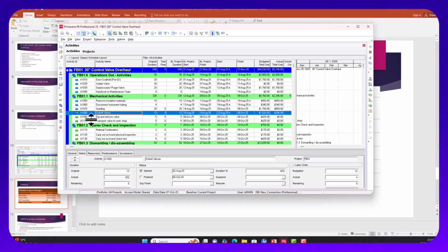So let's go ahead. So first of all, you're going to look at your activities, because you have two categories of activities that should bother you here. One is your activities that are already in progress. They have start dates, but they've not been completed. Then the next one are your activities that you've not started at all. Mind you, you need to focus on the activities that are in progress first. Make the changes and see the behavior before you know what next to do.